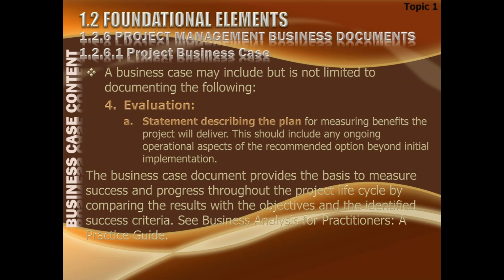So that is something which I have already talked with you about. Benefits could be realized even after the project has been closed. So this should include any ongoing operational aspects of the recommended option beyond initial implementation. The business case document provides the basis to measure success and progress throughout the project lifecycle by comparing the result with the objective and the identified success criteria. So where we are, where we want to be.